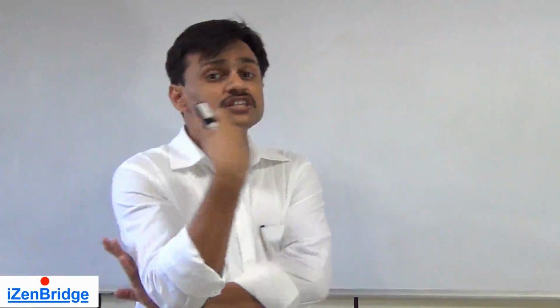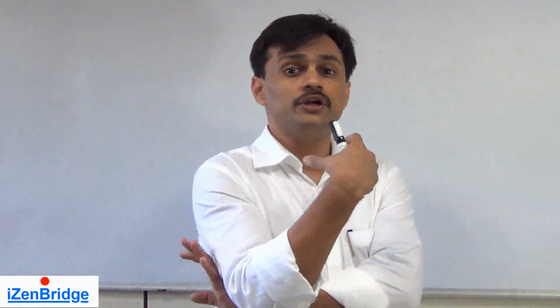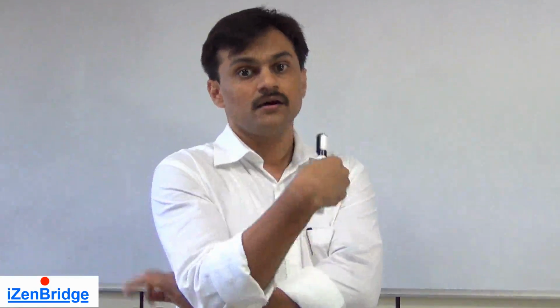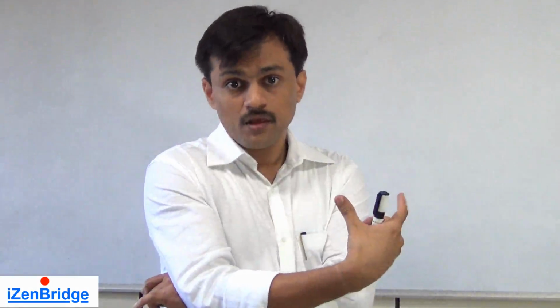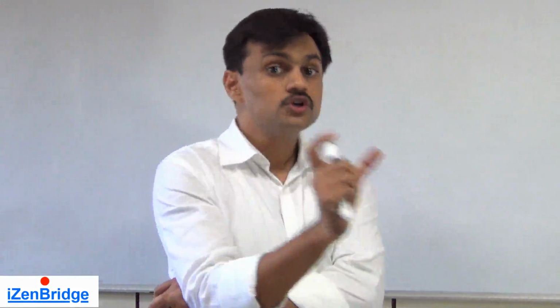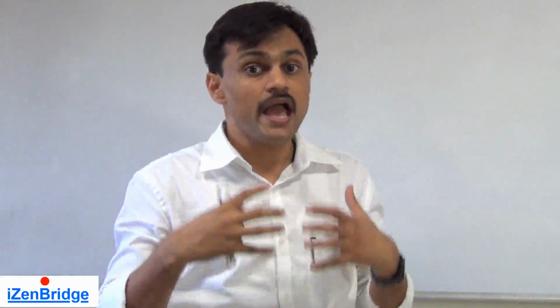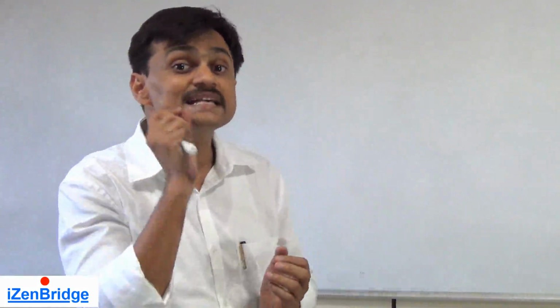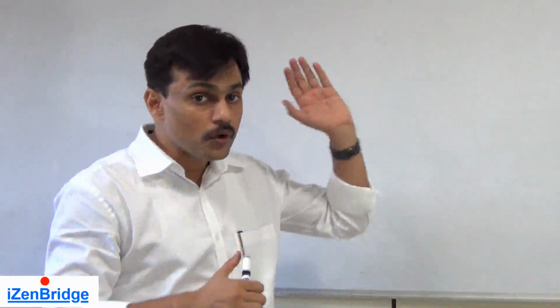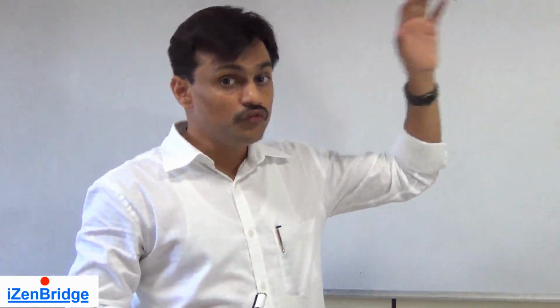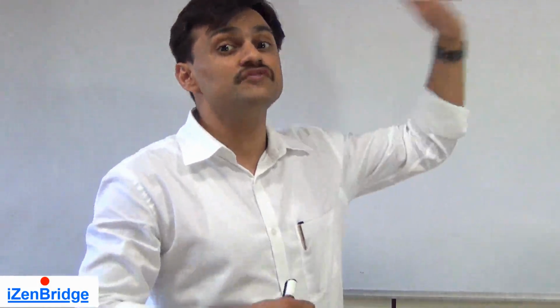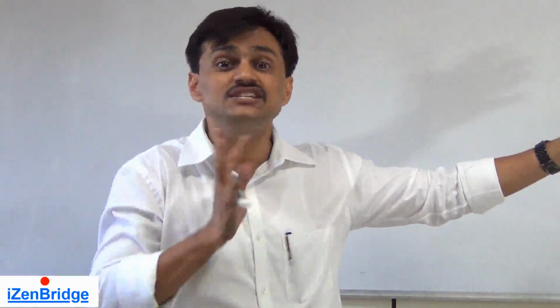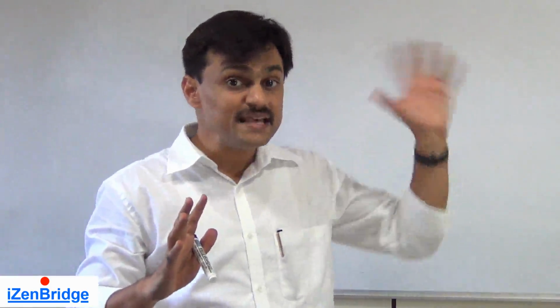You need to understand the organization's attitude towards risk, because the risk management plan will tell us how we are going to identify, rank and monitor risks. So the organization's attitude towards risk, the stakeholders' attitude towards risk, is a very essential input for project risk management. The risk management plan will tell us which risk should be taken at a higher severity. For example, an organization may be very sensitive towards time-related baselines.